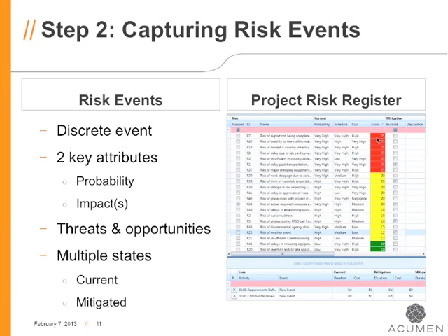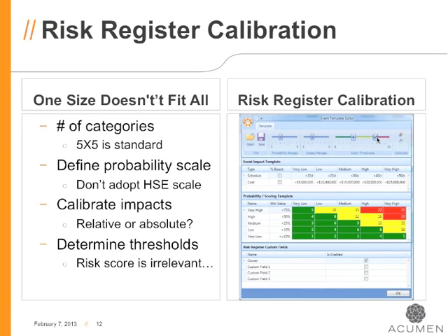I would argue you actually don't know, because if that risk event is impacting work in the schedule that carries 7 months' worth of float, that 6-month risk is just going to eat 6 of the 7 months of float. You're still going to have a month's worth of float. It's not going to have any impact whatsoever on the first production date. And that is really one of the main reasons why it's so important to conduct a quantitative risk analysis in the form of a Monte Carlo simulation.